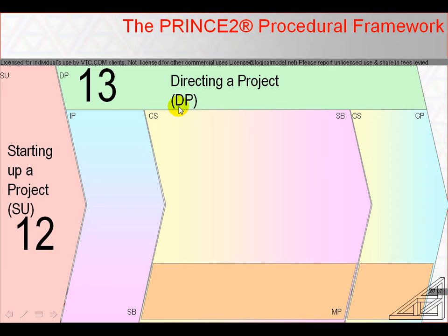They're all focused on whether and on how the project should continue based on an examination of the outputs from stages and exception situations. For anticipated decisions, i.e. at the end of stages, rather than exception situations, the outputs reviewed by the project board are things like end stage reports and eventually the end project report.